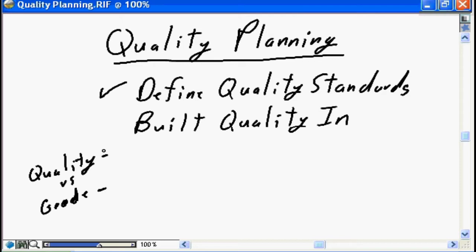Now you may think, wow, what kind of report would that be? What good is a report that's 80% accurate? Obviously the customer would be ecstatic if the report was 100% accurate, but they understood that we had to get sales figures from a large number of stores, from hundreds of stores, that there would be issues getting the sales figures from 100 stores as of midnight the night before, prepared, consolidated, gathered, and distributed for noon the following day, a 12-hour window. If the store had problems, if power failures existed, if communications channels were down, there were all kinds of variables that could result in us not being able to produce the report at 100% accuracy by noon. So therefore the customer's expectation of quality was 80% accurate, where the grade was the reporting of the sales figures for the past week for as many stores as possible.